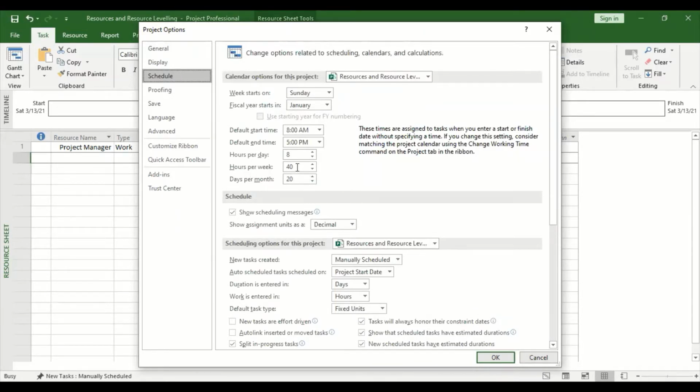So now that means how many hours per week? There are 40 hours per week. So if you know that in a month there are 4 weeks, how many hours will they be working for a month? That will be 4 times 40, that is 160. So you can get their total salary and divide by the number of hours. Then you get the rate per hour.